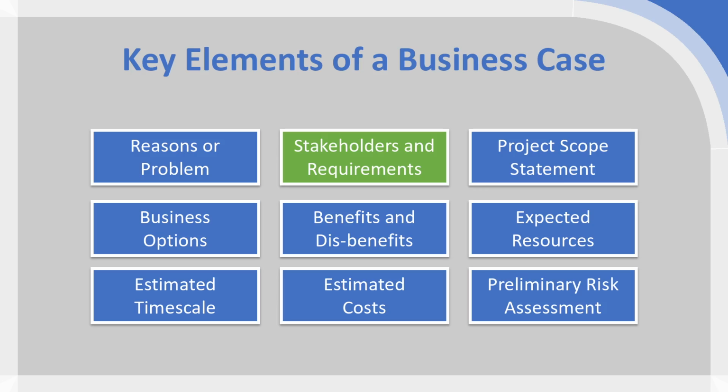The IT staff will be stakeholders if there's IT equipment such as a projector or computers in there as well. And then you have the facilities management, or the people who actually manage the entire campus, for that particular classroom or lecture theatre. So stakeholders can be quite broad. We need to really identify all of the stakeholders involved, in order to get all of their requirements.